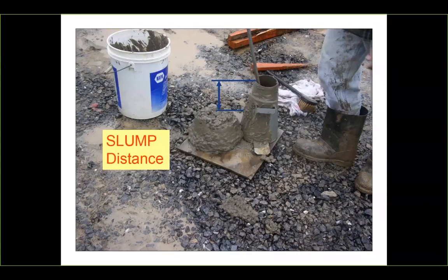Make sure that you're getting the right slump from the concrete trucks. These are all things that you have to pay attention to. If it's called out in the specifications as being a part of the inspection plan, you performing quality assurance should at a minimum be able to verify what the contractor or the general manager for the site or the landowner is going to provide to you as saying that, hey, we met your standards and specifications and you need to pay us because the project is complete. Before we get to that point, we should be able to verify some of this stuff.